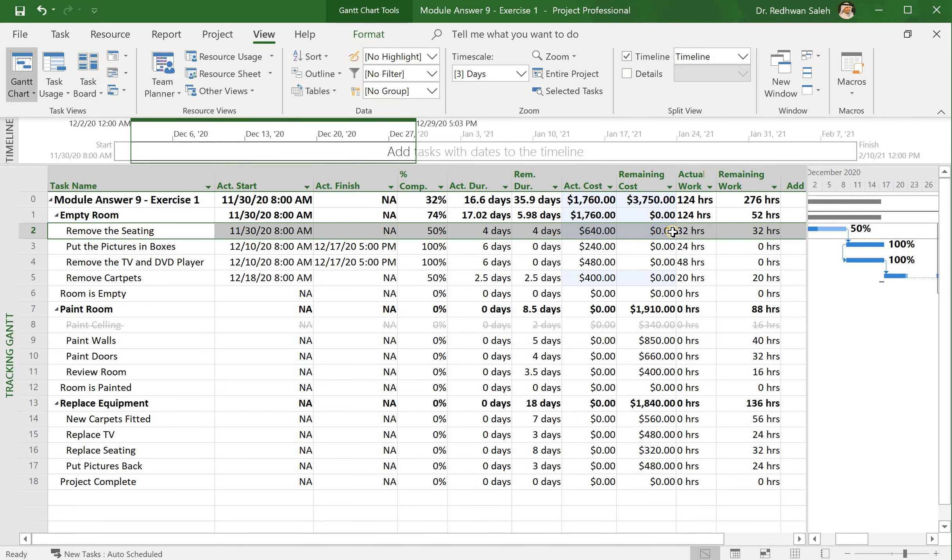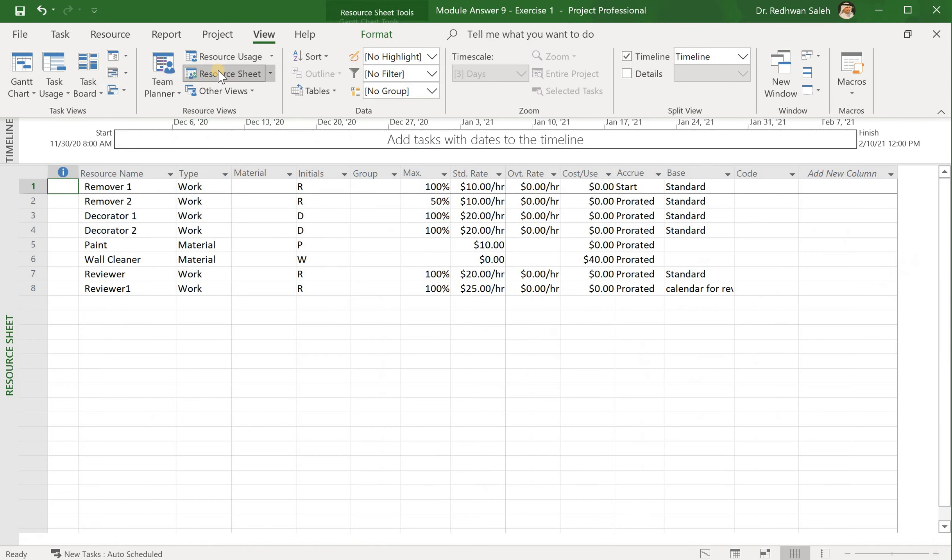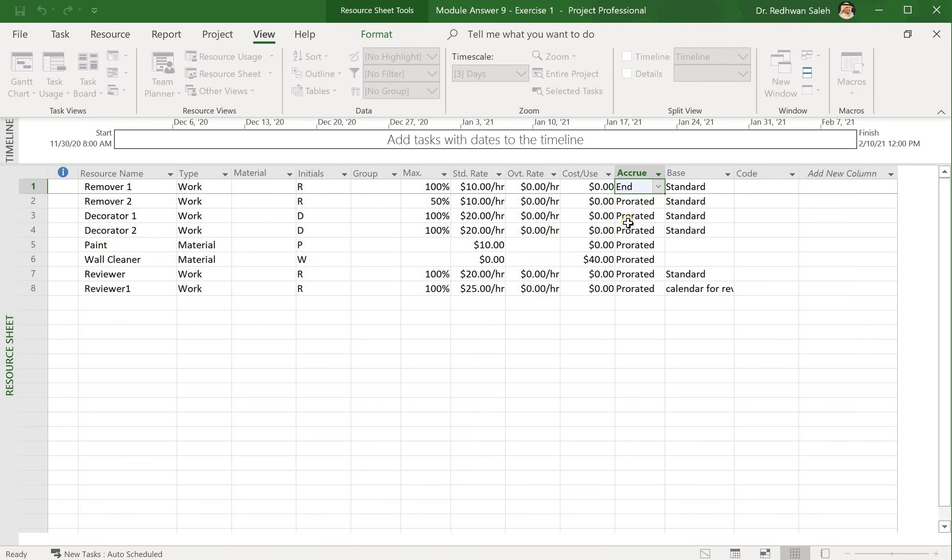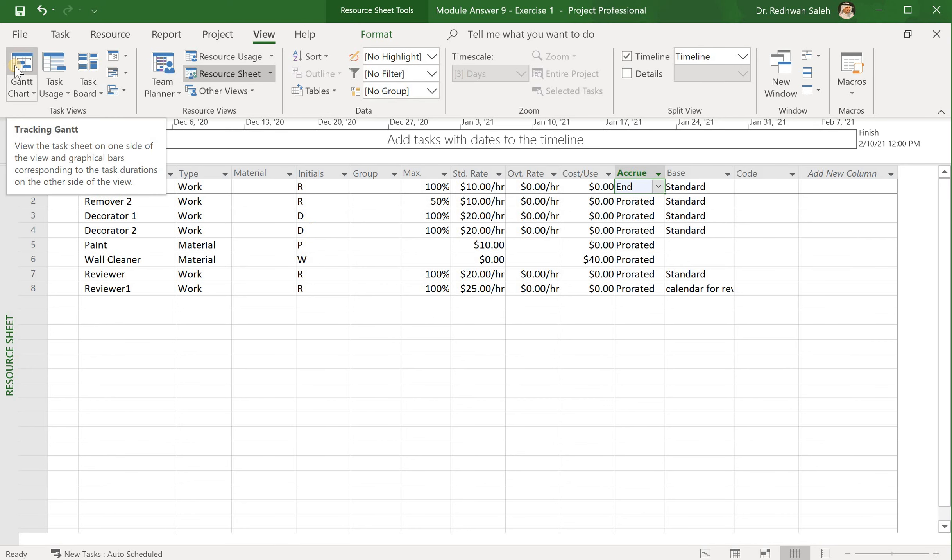Then I go back to the resource sheet, I change Resource 1 from start and have it added to accrue at the end. And if I go to the Gantt chart again...